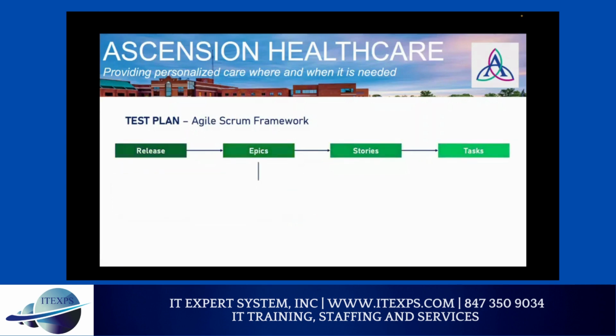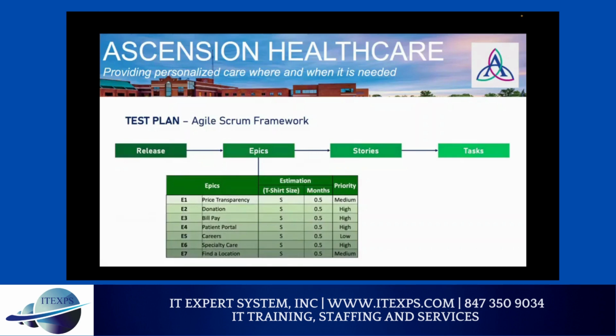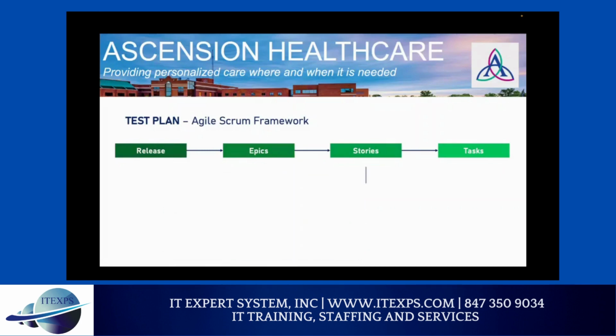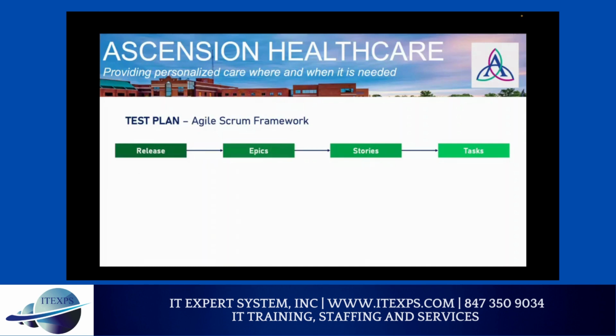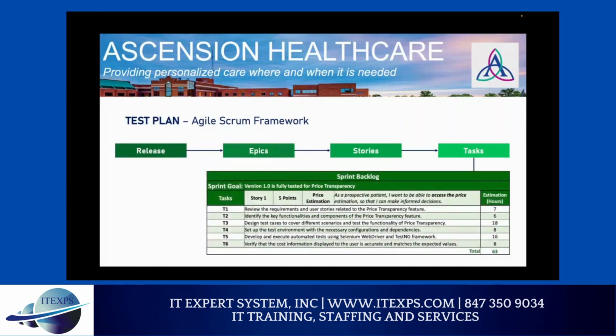followed by the epics, which were based on the key functionality that we mentioned in the scope. Here we also listed the planning and complexity of each epic and how many hours we would assign to them. The stories told us what the epic's functionality was going to be. They spoke in detail about the breakdown. And the tasks were how we were going to implement the stories that we had already set. They estimated how long we would take and divided each task accordingly.